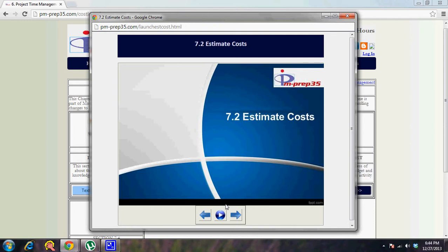So these are estimation techniques. You also have a parametric estimation technique wherein you can easily relate it to square foot. What is the rate per square foot? That's used in the construction business. These are based on proper models built in as to how that area will grow in a few years, and based on that they decide on the cost per square foot.